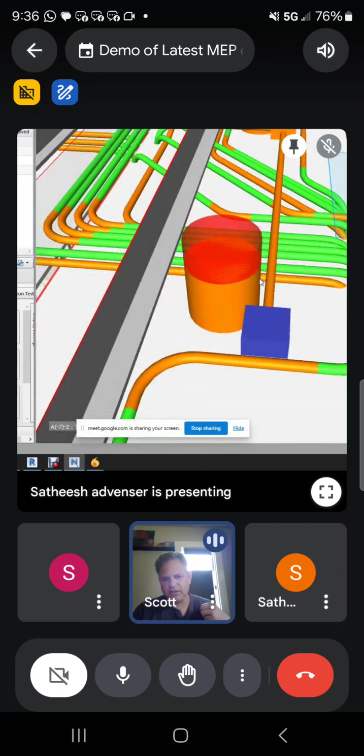And there's going to be a little ring set that crimps it. But again, we want to see a full material list. If it's PVC, how many male connections do we have? How many couplers? How many 22-degree angles? How many 90s? So we don't have to come back through and do all that.